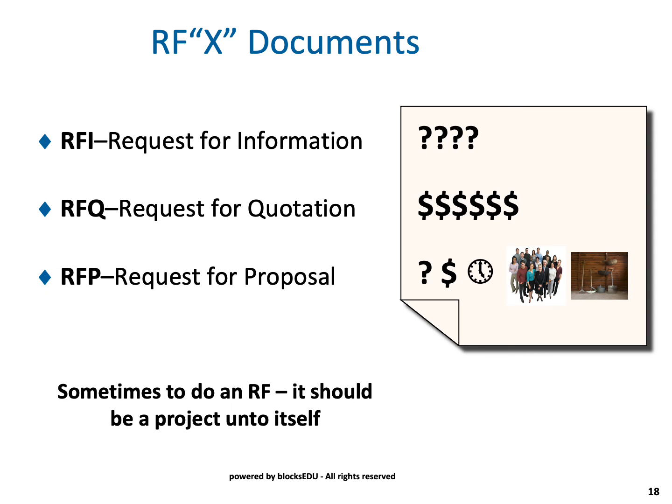That may take a huge amount of your time or your project team's time to go through that. If, for example, you do not adequately or equally go through and assess everyone that's applied back for your request for proposal, you're liable to be sued for the full amount of that project that's been awarded to somebody else, because you have to turn around and evaluate every one of those requests for proposals that's given back to you.